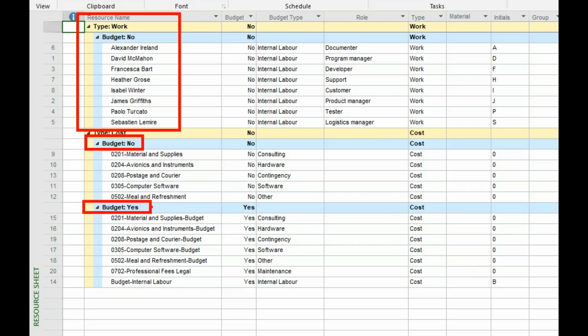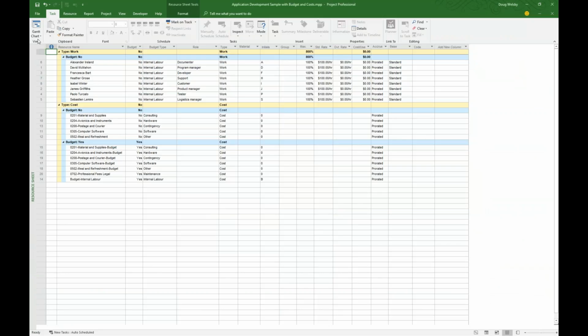So the way Project Pro works is that these budget type resources are added to the summary task level within the project plan, that task 0, which you need to expose, and then a resource budget for those budget type resources is created in another view that you step through and estimate over a time-phased approach when you anticipate using these different budget resources. You can then subsequently assign these budget type resources to different tasks within the plan and capture costs for those various budgeted resources over time as the plan is delivered.